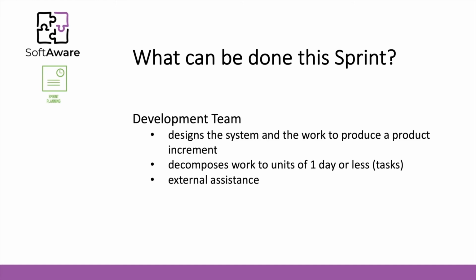On the other hand, the development team should also design the system and the work to produce a product increment. So the idea is to decompose the work into units of 1 day or less. They are commonly known as tasks. You grab one item available in the product backlog that was given by the product owner, and you decompose that work item into several tasks.